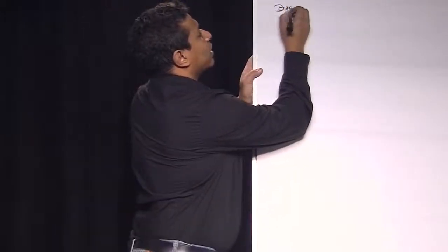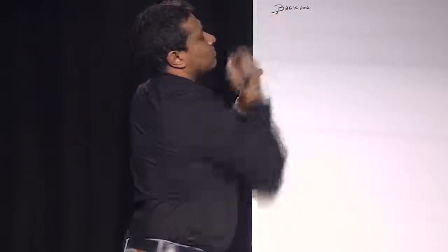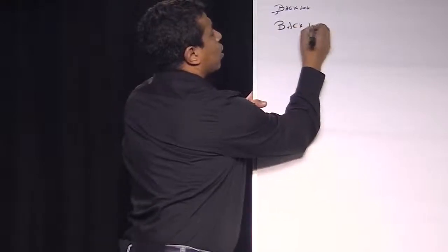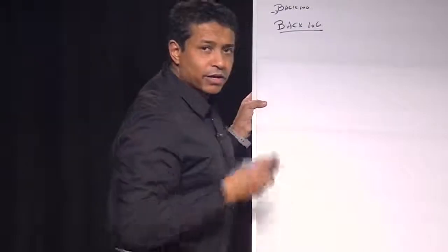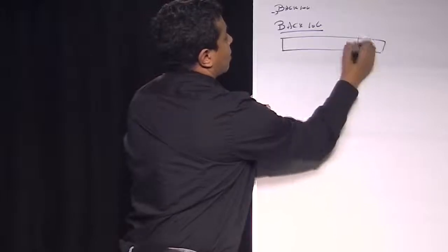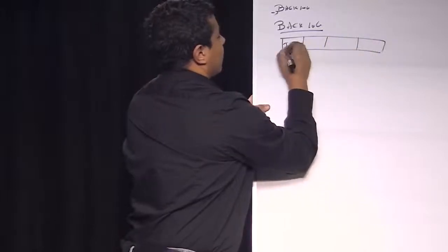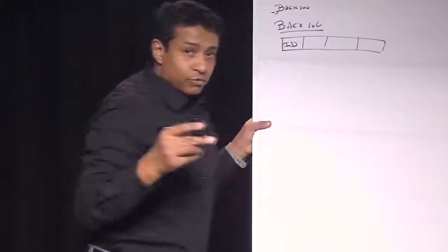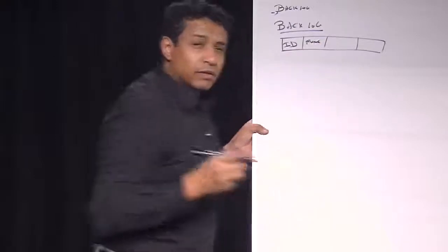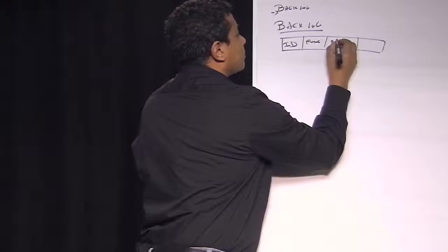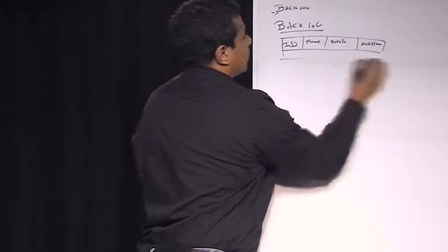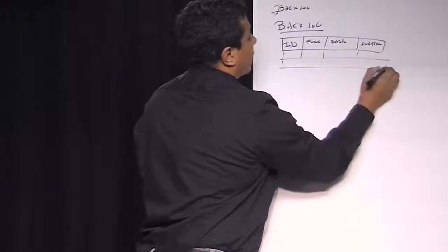We said backlog. First of all, we say here backlog, a little bit larger, so everybody can see what I'm talking about. As we said, the first line in the backlog describes my ID, to make the priority, the functionality, okay, and the details, and the duration. This is the beginning of the backlog.